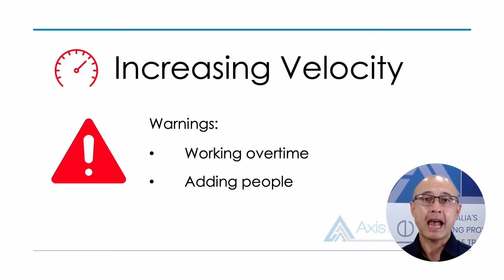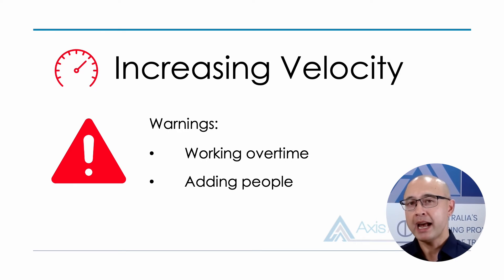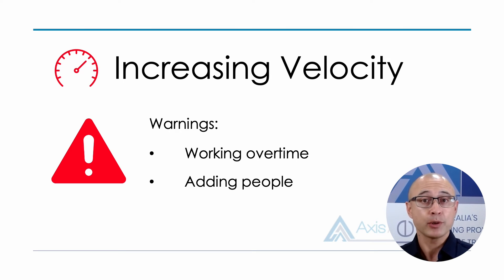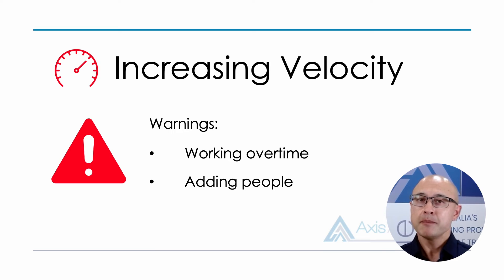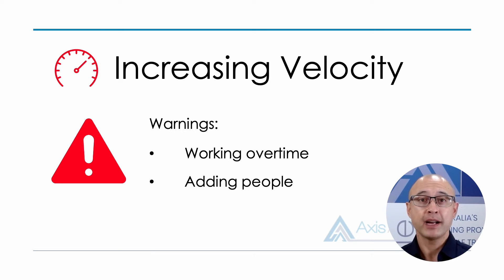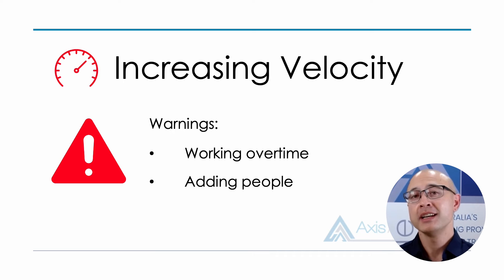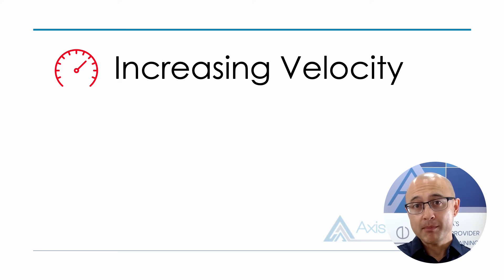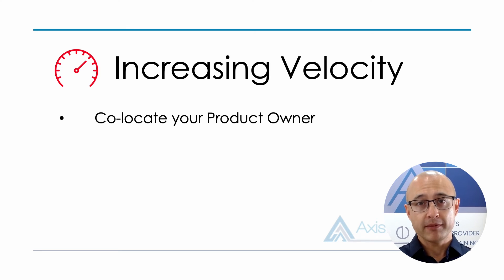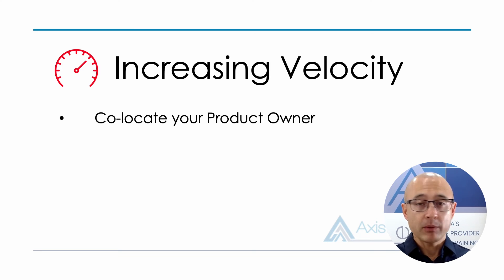Adding people to the team might sound like a good idea, but when you add a person it doesn't speed things up at first — in fact it can slow things down. That new person needs to be brought up to speed, and usually you take the most experienced person on the team to do that. So be careful adding new people late in a project — you might actually find the project goes even later.